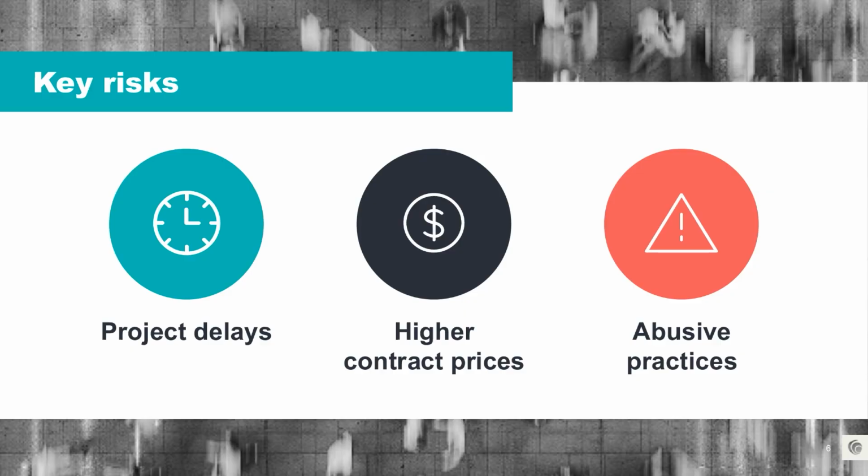Extended schedules often mean additional carrying and ancillary project costs. This is often in the form of extended general condition costs from your construction manager, along with other carrying costs for your organization, such as potentially more interest on your construction loan or bonds and extended insurance costs during construction. Additionally, delays can also result in lost production if your facility is intended to generate revenue, which can also have a deep impact.